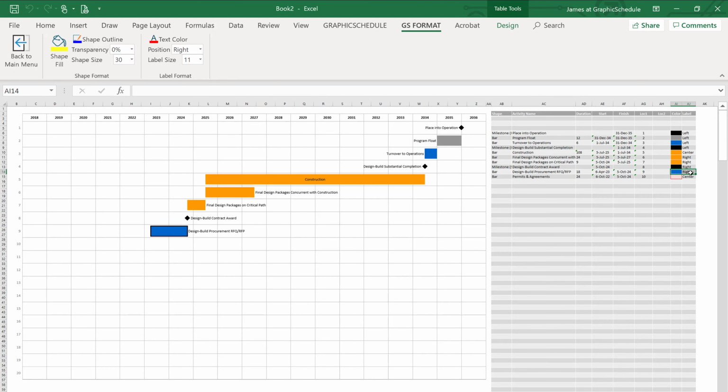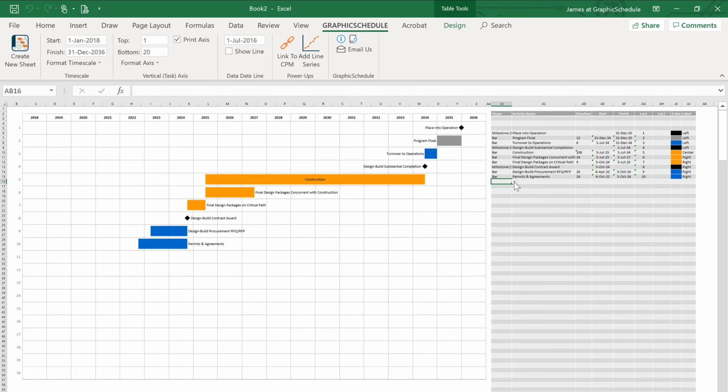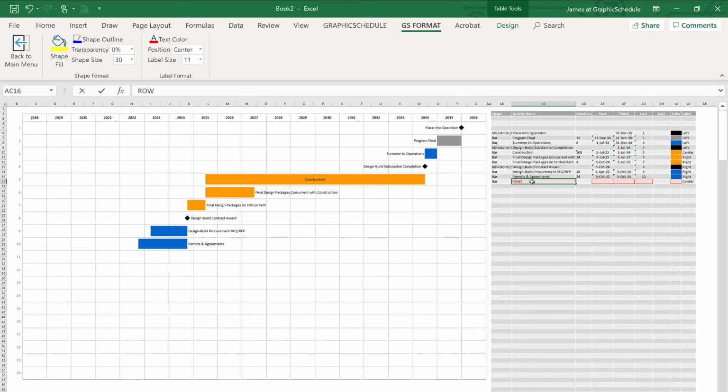During this period, the owner may also need to obtain critical permits and agreements with third parties. Right-of-way acquisition is another activity that needs to be accounted for during this time frame. And a preliminary design phase is required to prepare the RFP drawings and specifications that will be included in the design build contract. By working backwards, we've learned that preliminary design needs to start in early 2021.